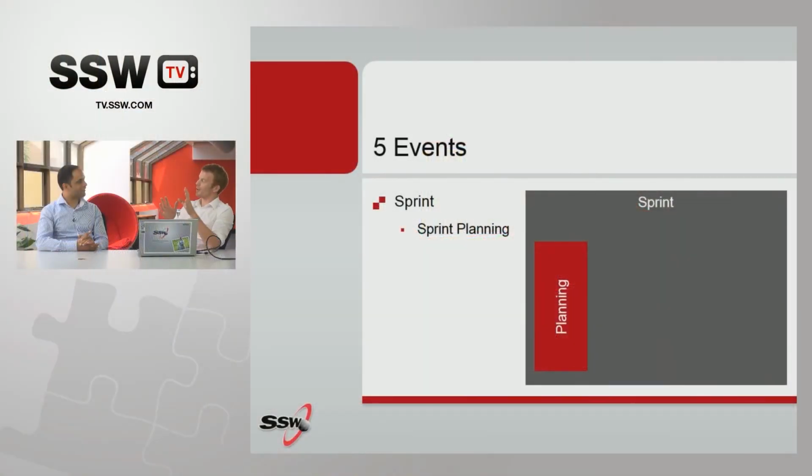So we still need to talk about the planning. That was the first part, that was the what. Then we move on to the how. The how is the responsibility of the team. This is where the team looks at the PBIs that they've taken and then starts to break them down. They don't necessarily need the product owner at this point, but it's good to have him ready to ask questions, because say me and you on the development team, we take the first product backlog item and we look at it, and the first thing we do is we have some questions about it. Our questions are going to be, what's this going to look like when it's complete? So we need to ask the product owner that question, give us some more information.